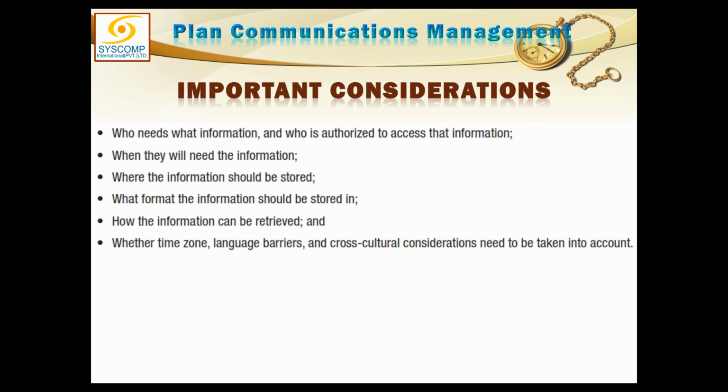If somebody wants to access this information later, should we give access to the database to that person if it is electronic data, or should we allow that person to go to the archive and pull out that file which contains that letter? So what information can be retrieved and how? Whether time zone, language barrier and cross-cultural considerations need to be taken into account or not. This must be clearly specified if you are working in a multicultural environment or you are working across the globe